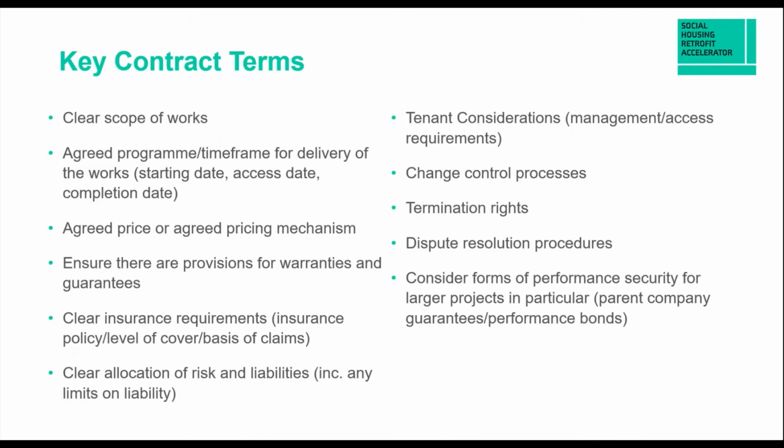Termination rights, so what rights of termination exist? Often we see central and local governments or public bodies require rights to terminate at will, particularly for situations where funding might be withdrawn. So it's important, if this is something that's required, ensuring that in your contract you have a right to do this. And key to that is also, what are the cost consequences of exercising that right? So be prepared and know how much it would cost to exit that contract, and any additional procedures and processes that might take place upon termination.